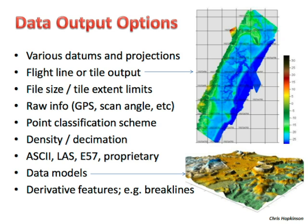You also need to decide on data models: do you want DEMs, DSMs, canopy models, or building models? And derivative features: do you want break lines, contours, wet areas, and other derivatives? The key question is whether to do these in-house or contract them out with the service provider, because it may be quicker and more cost-effective to get those derivatives at the point of delivery.